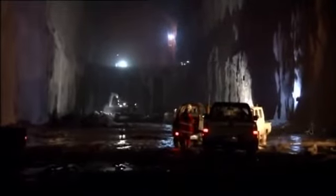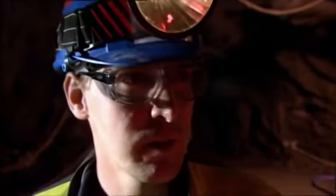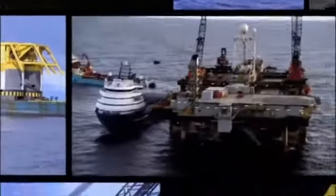They come back with their heavy machinery and they start mucking up the rock, and they continue that for approximately 20 hours. And then they start to do it all over again. How many blasts left? Probably around 6-7 for this bench that we're blasting now, and then we have some smaller stuff left to do later. We hope to be finished in 1 or 2 months with this cavern. It's noisy, dirty work, and it's going on round the clock. Deadlines have to be met if they are going to be ready for the gas.